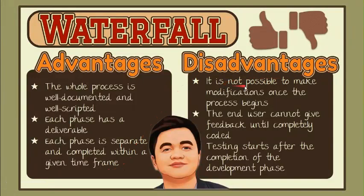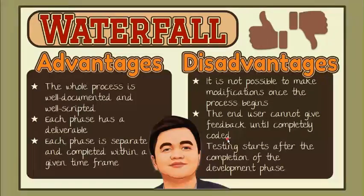For the drawbacks, this model is rigid. It is not possible to make modifications to the requirements once the process begins. There is no room for feedback during the development process, and therefore no room for reflection and revision. This model is not favorable for big projects which involve frequent requirement changes. The end user cannot give feedback until it's completely coded — for example, during development, the end users may realize that a feature being developed is no longer needed, meaning developers could be wasting time building it. Testing starts after the completion of the development phase, which may lead to late detection of bugs and design issues. Therefore, you don't know how stable the system is until the end.